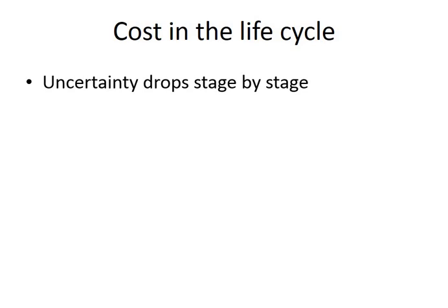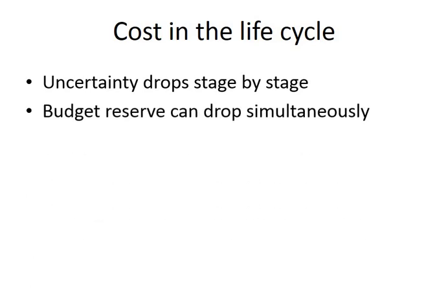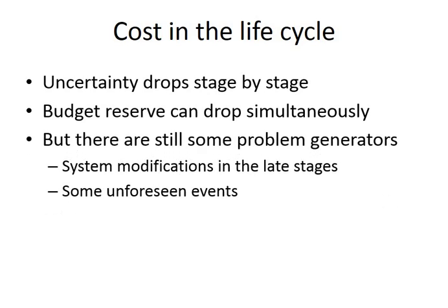The more advanced your project is, the more certain you are about how much extra money you'd need. So you can drop your reserve, and of course there can be some unforeseen events at the very end, so it means that usually you cannot decrease your reserve to zero before you have finished your project, of course.